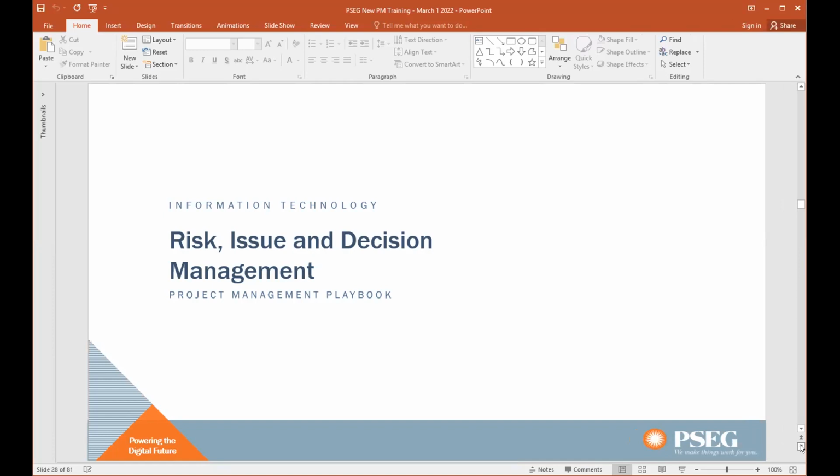After you decide the methodology, you have to find out what all the deliverables are according to the SGP under each of the stages. Look at the table that was provided to you. Look at the project categorization and the stage you are in. Look at the deliverables and start preparing or executing those things. As you complete that particular stage, you are reaching the gate.